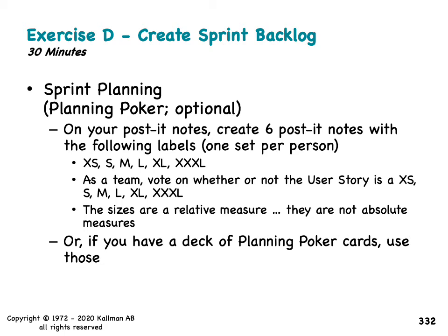And so at that point in time, because the team was able to break down the chunks of work down to small enough sizes that were consistent in size, they were able to eventually get rid of doing points, which saved the team a ton of money. Okay, so you have to balance the overhead of doing an activity versus the time savings.